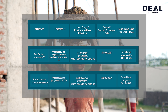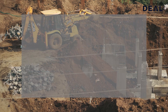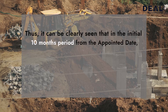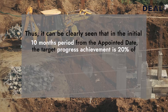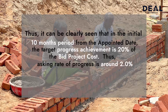For the Scheduled Completion Date, which requires 100% progress in 900 days or 30 months, the date is 30th June 2024 to achieve full progress of Rs. 1000 crore. It can be clearly seen that in the initial 10-month period from the appointed date, the target progress achievement is 20% of the bid budget cost. Thus the asking rate of progress is around 2% per month.